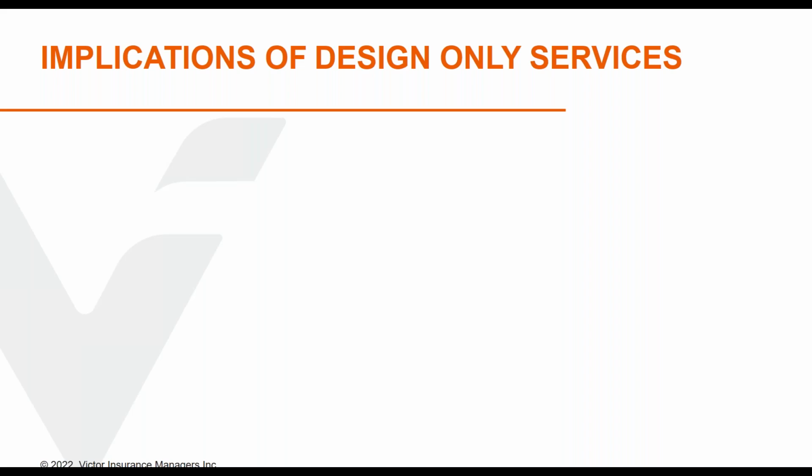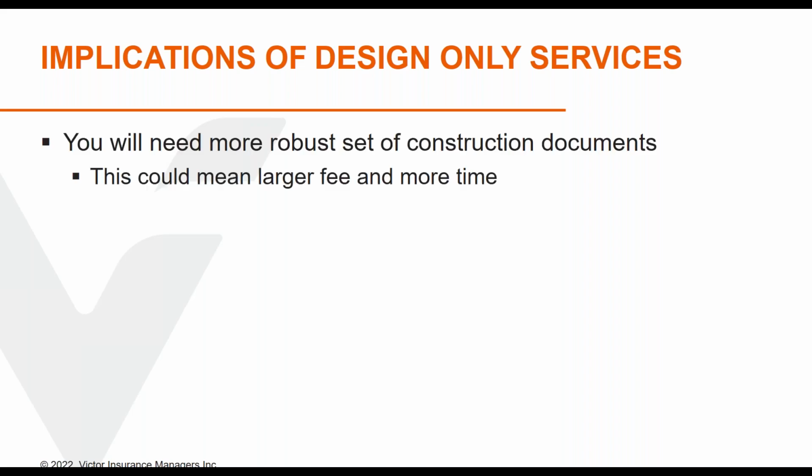Well, if the client decides from the beginning that you will not be involved in the construction phase, then you can properly negotiate an increased fee and potentially have more time to address the challenge. And the reasoning is that, hey, client, you've told me specifically that I'm not going to be involved in the construction phase.